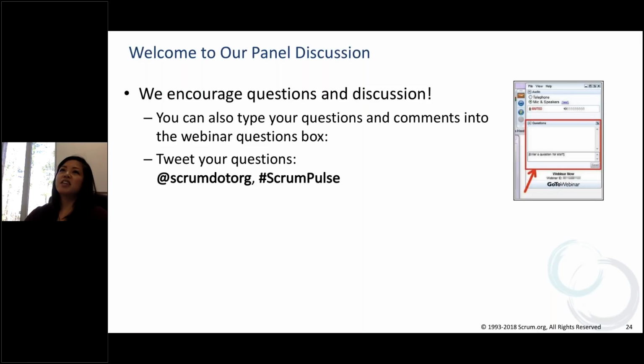Another way to think about that is to think about what Scrum of Scrums is trying to address. We have something like the Nexus Daily Scrum, where the right people from the different teams, so not always the same people, but the right people, are coming in to talk about what our major issues are today as a Nexus. Are there any integration issues? Did you break the build? Did anything happen? No? Okay, let's move on. That's what's important at scale, right?